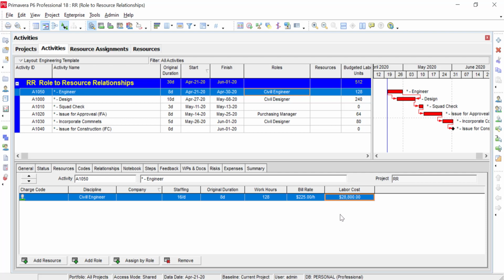So in this template, we spend a little time. We build it, we logically tie it together the way it's supposed to be. And that way, when the new user comes in, they can copy the template and paste it. So let's say you don't use the cost. At least you know how many hours it takes to do a typical package. So I can take this now and share this with the team. So my roles are created, they're used, and we're ready to go to the next step.